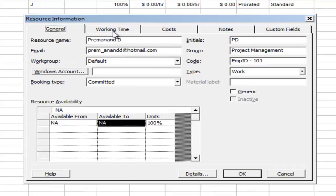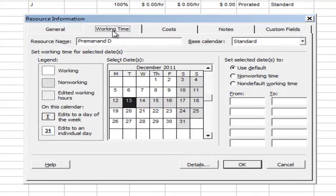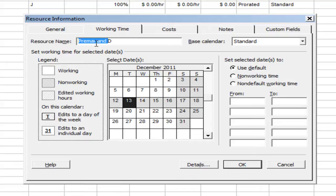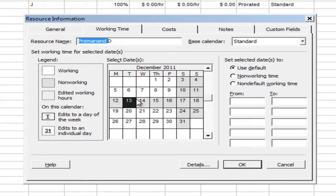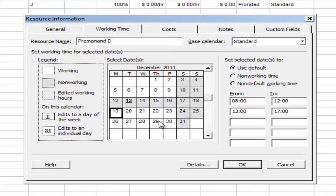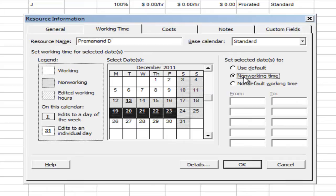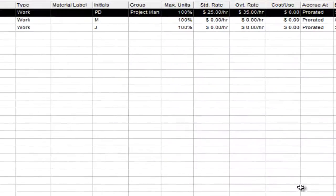Now this is a very critical thing where you can see the working time. This is the working time of this particular resource during the year. You can see the resource name is selected as Premanand. You can set the week vacation or the non-working times for the particular resource. What I'm going to do is set up the week starting 19th until 23rd as non-working time, not for the project but for this particular resource. And I'm going to save that.